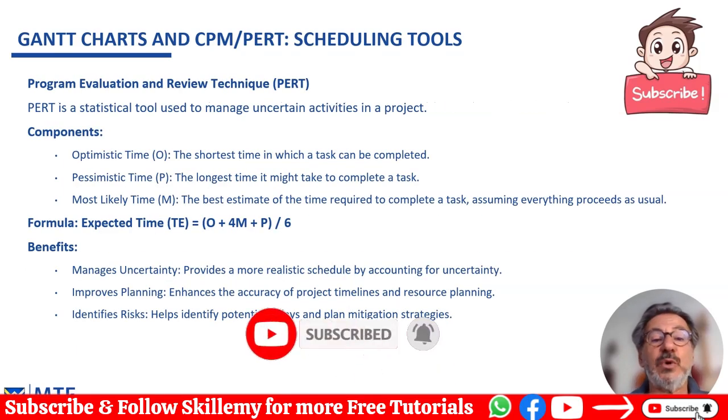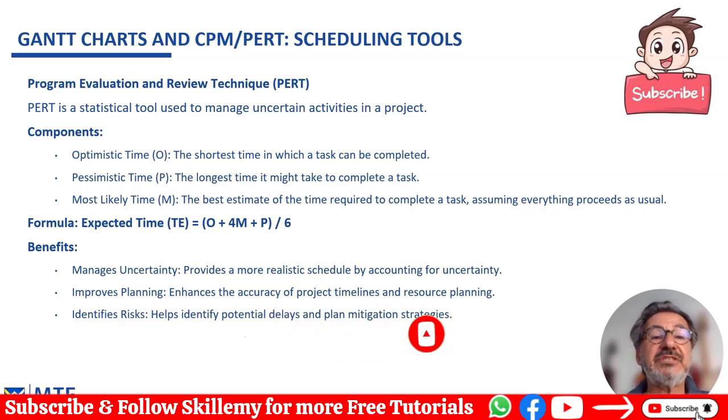Now for Program Evaluation Review Technique, the PERT. As we said before, it is a statistical tool that is used to manage uncertain activities in a project. Components: optimistic time, that means the shortest time in which a task can be completed; pessimistic time, the longest time; and the most likely time, somewhere between the shortest and the longest, assuming that everything proceeds as usual. The formula is O plus 4 times M plus P, divided by 6, which means that the most likely time has 4 times the weight of the optimistic or pessimistic.